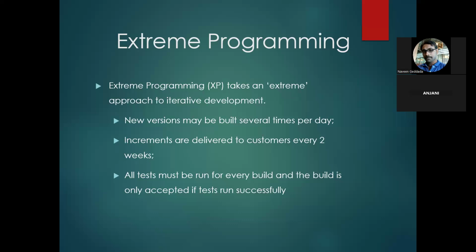In Scrum, the login user story that has been assigned to me will be moved into the sprint release. Once the sprint release is done, then we will look at how the login screen has been developed. But here in extreme programming, when you say that your user story for the login screen is done, then at the same time, instead of waiting for the sprint planning, you can have a demo on the login screen, or the user story that you have designed, so that you can have multiple versions which can be released in the 2 weeks of the sprint.